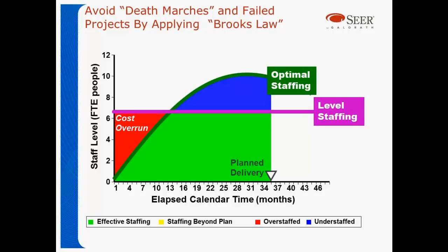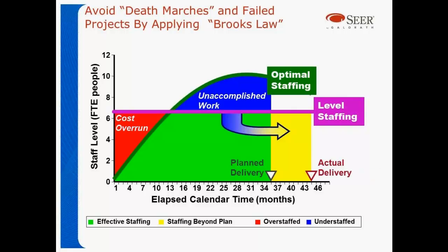So all that work needs to be done, which means the project gets later. The point here, I'm not saying that they had the budgets or had the resources, but if they could have planned for those, they probably could have got some of the things done in more optimal time frames. And in looking at projects in the future, using and honoring that minimum time can be very helpful. It's part of what's called Brooks' Law by Frederick Brooks.